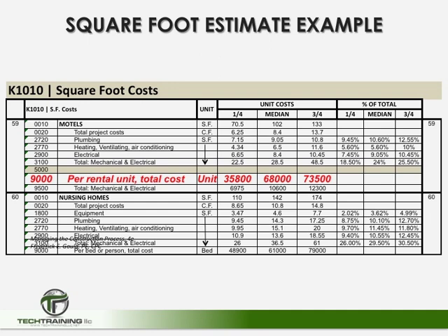Now, since this is a conceptual estimate and we are planning on using unit costs, we can see up here the list of unit costs. But we also see that it is broken down into 3 separate categories. So here we can actually adjust our price for quality. The 3 categories are quarter, median, and 3/4.